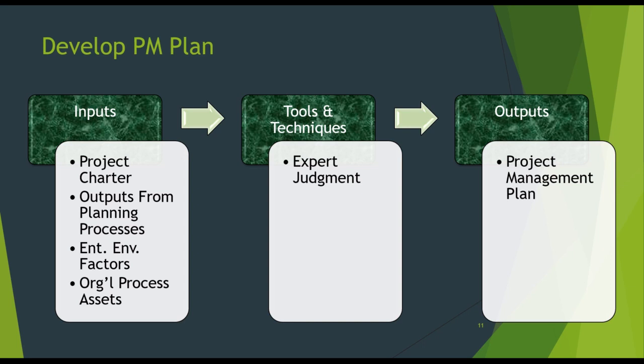So how can we create the project management plan? First, identify the goals of the project, map out the scope, that is, create the scope statement, and develop an outline for the plan. Share the initial idea with your team so that they can discuss it and provide their own suggestions. Then finalize your plan, and use a Gantt chart to keep things organized in a chart form. Distribute your project management plan to your team so that they can provide suggestions, ideas, corrections, etc.